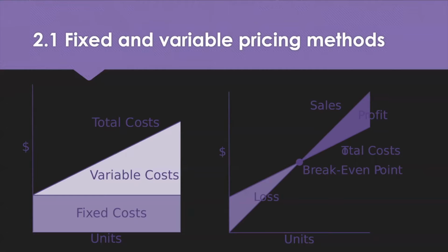There are advantages: fixed pricing helps you to forecast. It's quite straightforward, but the buyer can't really benefit from any decreases in the supplier's cost. Whereas with variable pricing, the supplier will use a strategy where maybe it's price plus margin or something along those lines, but it means that if the market fluctuates, any benefit, but equally any negative, is passed on to the buyer. So you do need to make sure you choose the right strategy.